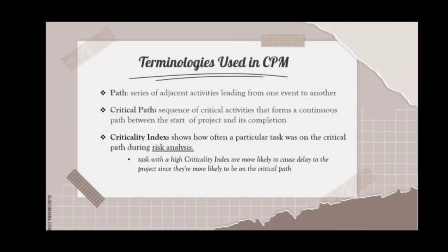Criticality index shows how often a particular task was on the critical path during risk analysis. It is said that tasks with a high criticality index are more likely to cause delay to the project since they're more likely to be on the critical path.